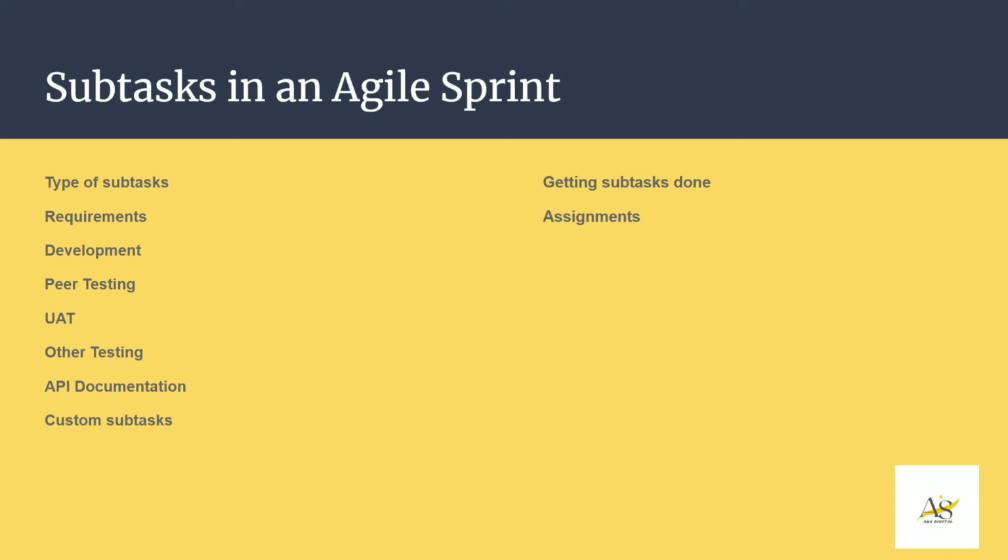The next thing is we want to review progress on these in the daily stand-ups. So while folks will be coming to your stand-up every day and reporting on what they did yesterday, what they'll do today, and if there are any impediments, we should give attention to subtasks as well. The next thing is subtasks, just like a user story, can be blocked with some impediments, right? So ultimately, to remove an impediment on a story, you have to remove or handle impediments for a subtask. So yes, this is an important piece of getting the subtask done.